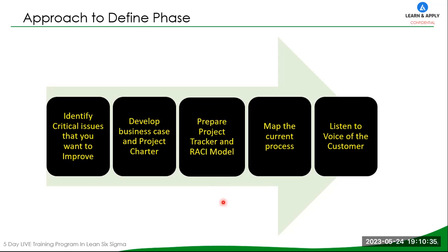Now, this is again very important because here we are going to make the tentative project plan and project tracker in the define phase. Periodically, as soon as we complete any one phase, let's say once we complete the define phase, we are going to review the entire thing. Once we complete the measure phase, again, we are going to review the project charter and project tracker. It is not the case that once we create the project charter and project tracker, it's done. No. After the end of every phase,